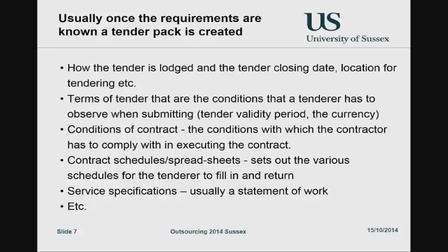of the responders to your contract to fill them in a certain way. Why do you do that? So you can compare things. Because believe it, it's unbelievable, being on both sides. Give them a chance, and they'll put it in any way they want. They put a whole load of fluff and pictures of people smiling from the last contract they did and how wonderful they are and all this good stuff. And you never get to what are you going to do for me, and how much it's going to cost, and all of these sorts of things.